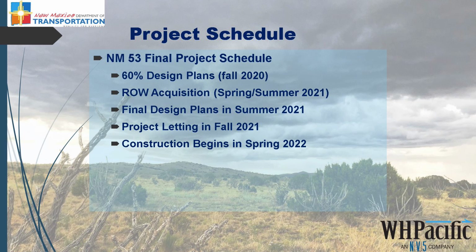So the project schedule consists of completing the design plans, in this case 60% design plans by the fall, having the right-of-way acquisition finish up in the spring or summer of 2021, and final construction plans completed in summer of 2021, and the project letting in fall of 21, and construction beginning in spring 2022.